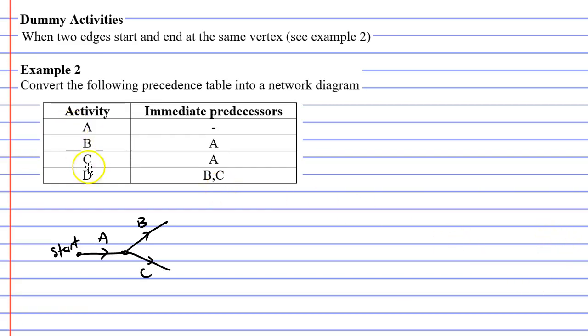Next you'll notice that activity D comes immediately after activities B and C. So we need activities B and C to connect to the same vertex. And once they are complete, activity D can come out from there. And then we need a vertex to show the completion of this project.